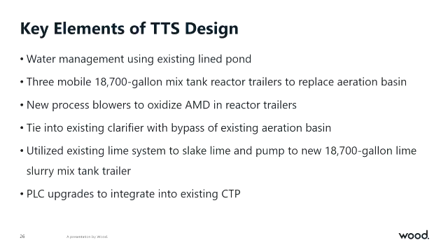Those existing lime slakers we were able to reuse and just bring lime slurry from the slaking process across the road to the temporary plant and just had a local dosing system. And then we ended up implementing a PLC over at the temporary system.